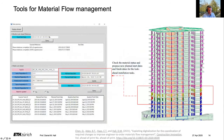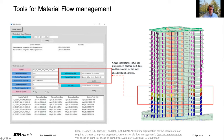We see the development of tools for material flow management. Dr. Sian Chen, who recently completed her PhD at ETH, developed a material flow management process that connected a BIM model with prefabricated columns and a graphical user interface so you could understand different changes in the supply chain. You can see different color coding for modules going through different stages — manufacturing, loading on the truck, arrival on site, installation, inspection. She set this up with an RFID system so it would be automatically updated — very advanced supply chain management tools.